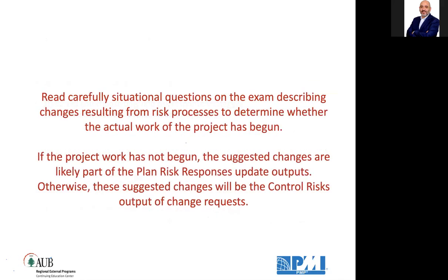So read carefully those situational questions in the exam, describing changes resulting from risk processes to determine whether the actual work has begun or not. If the project work has not begun, the suggested changes are likely part of the plan risk responses update outputs. Otherwise, the changes will be part of monitor risks output. Any questions?